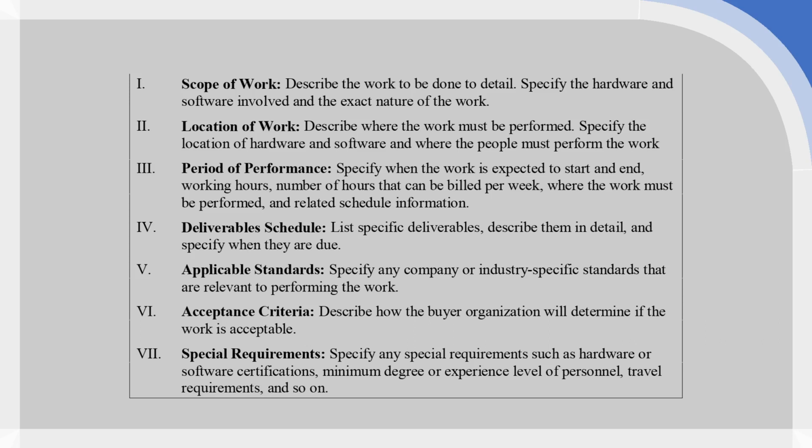The period of performance. So this has to fit into your operational schedule or your project time management schedule. So your expectations regarding when the item is to be produced or the work to be done, and when it needs to be completed by. If you have physical deliverables that need to be produced and handed over to the procurer, then those should be listed quite clearly, as well as their due dates in the deliverable schedule.